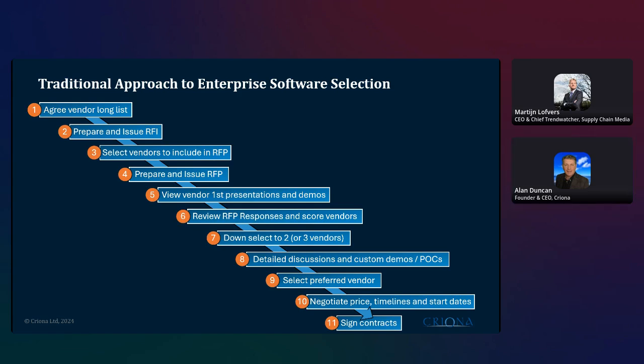I've done it personally in 3 months, and it was possibly the most stressful 3 months of my entire career, to turn around an evaluation in such a short time. Now, I would say a comfortable timescale is about 5 to 6 months for a planning solution, or something complex like that.